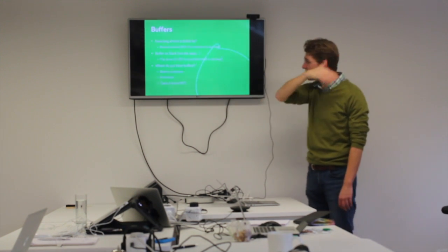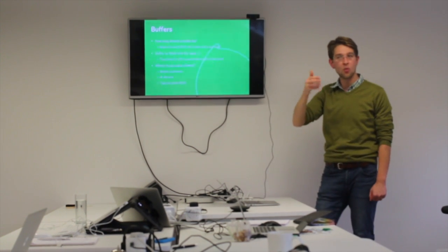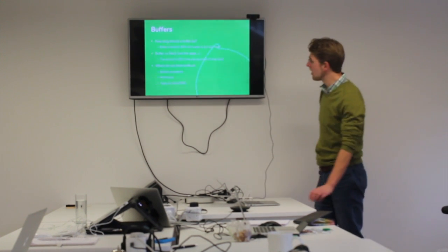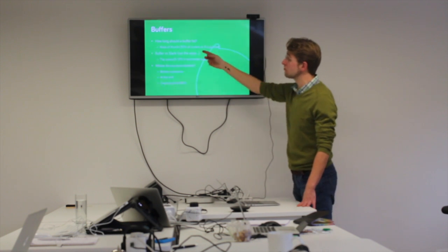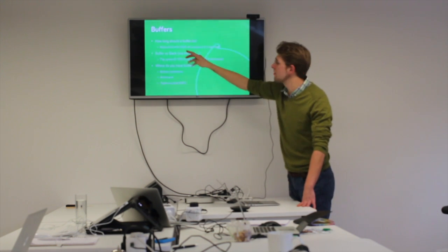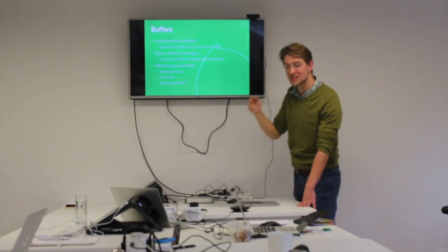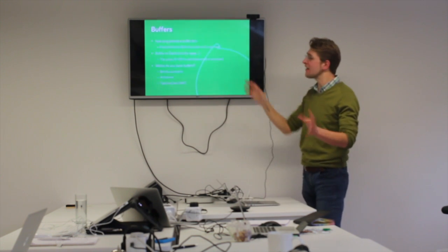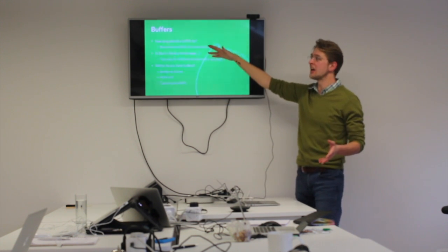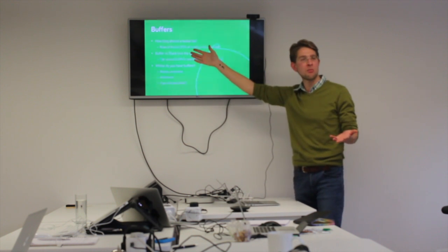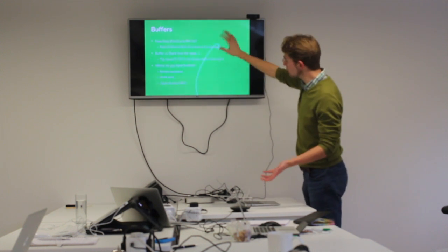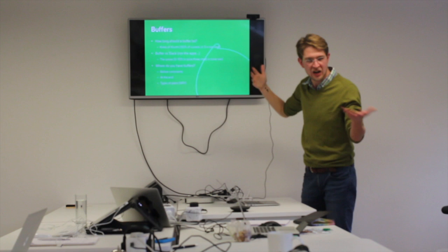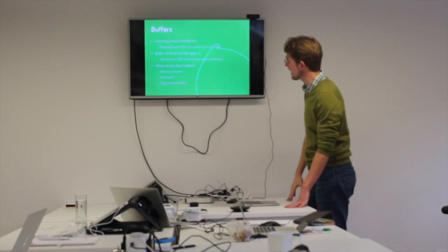And the reason for that is that you have work that's waiting quite a lot of the time. Or alternatively, you can set the length of that buffer by saying, how long does it actually take to service this piece of work, and then multiply it by 3. Now again, these are broadly rules of thumb from physical manufacturing, so we may find that they don't apply, but I'm sharing with you the knowledge that I have at the moment.